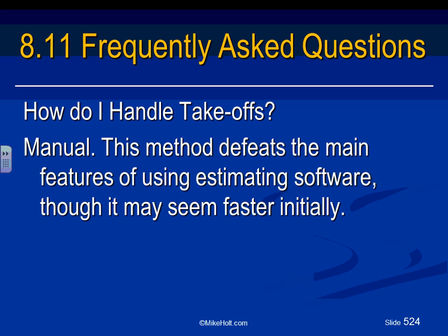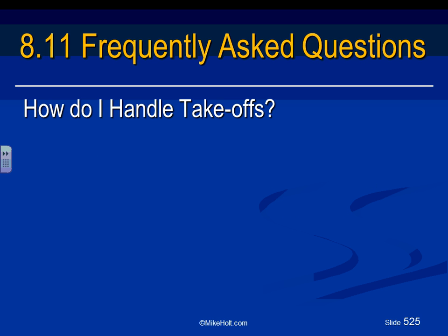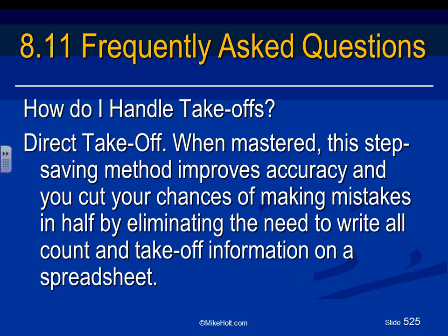So you have a huge screen in front of you and identify all the components, and the system will be able to count all your receptacles, assign an assembly for them, and actually you can redraw through the PDF, on the screen, everything that you redraw, Jeff, for me here, you can do it on the PDF file on the screen. Then you have a record of it, and you can change it on the screen. So that's ultimately the goal. They call it direct takeoff.